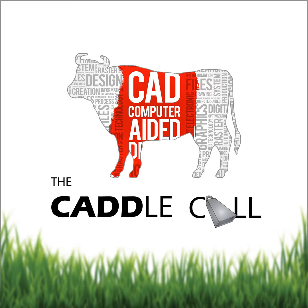Good deal. All right. So the second process that we wanted to touch base on here today that can be really useful for systems companies is working with a PDF-based quantity takeoff estimating system. These systems use the PDF version of the construction documents as a base to lay out and design your system. And the real benefit here is that PDF files are always available on every one of your jobs. They're the common file type that we all get for bidding and reference on any modern project. Nobody wants to send you paper anymore. They just want to give you the PDFs.